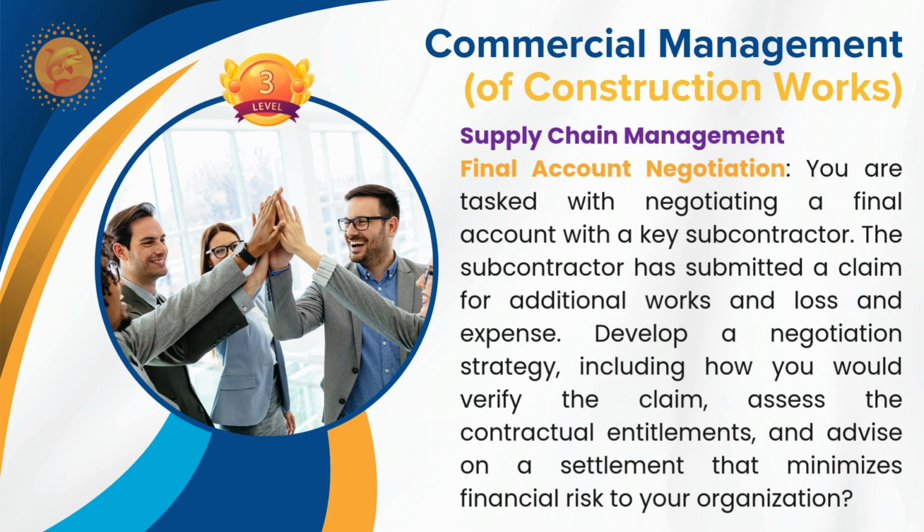That is very important. If their delay is carried forward to other subcontractors or suppliers or the main contractor, then it is going to be a problem for the main contractor because the delay damages and other losses are much higher than the subcontractor's.